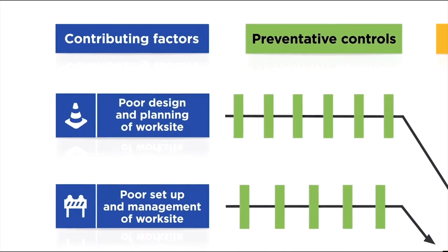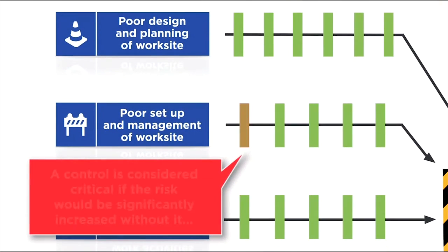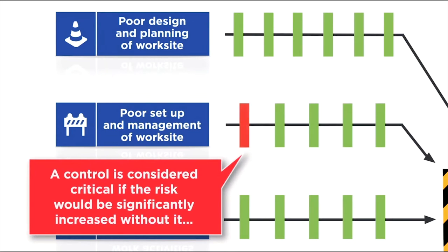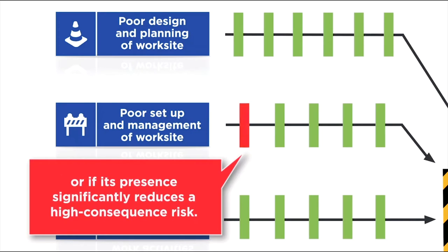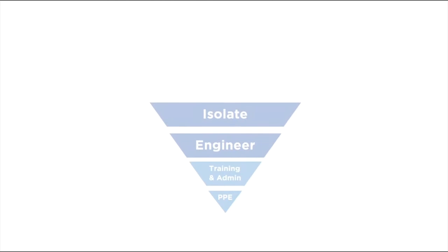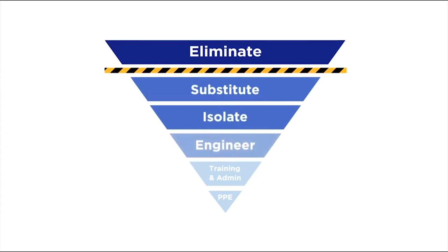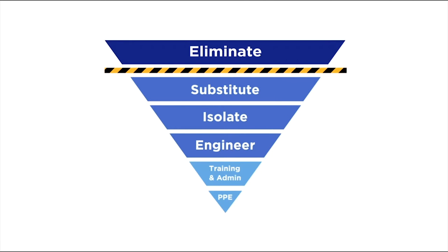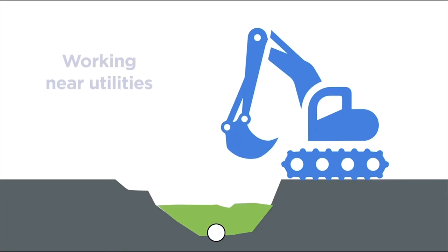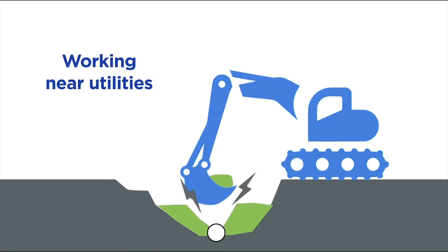Once all controls are identified on the bowtie we need to determine which controls are critical. A control is considered critical if the risk would be significantly increased without it, or if its presence significantly reduces a high consequence risk. Thinking about critical controls helps us focus on higher order controls as the primary means to keeping us safe. They also highlight areas where our assurance activities and efforts should be spent. Let's look at a bowtie used for working near utilities and the controls used to manage the risks.